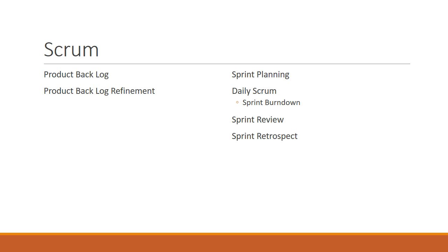A lot of times those tasks are less than a day. Things are broken down to such small granularity that a lot of times the tasks are hours, or a couple of hours. Basically, instead of building one large shippable product, you end up building one smaller shippable product at a time, and that keeps the customer happy, keeps the business happy, and gets you to the point where you have built pretty much the whole thing.